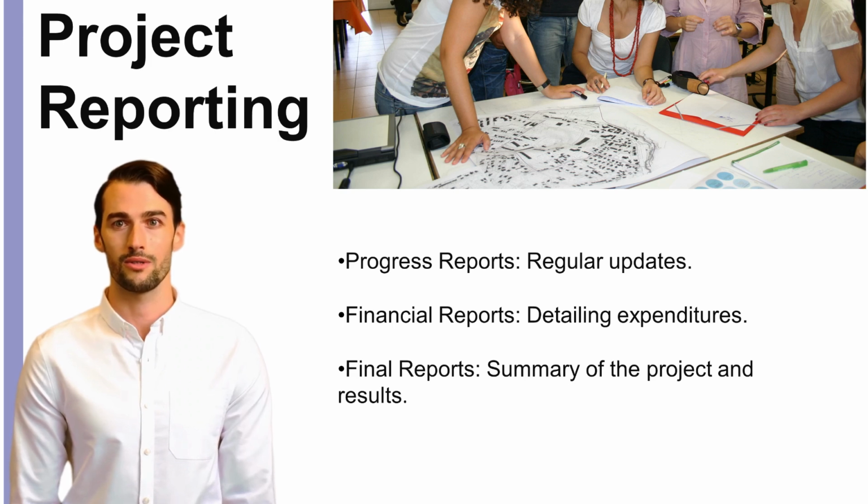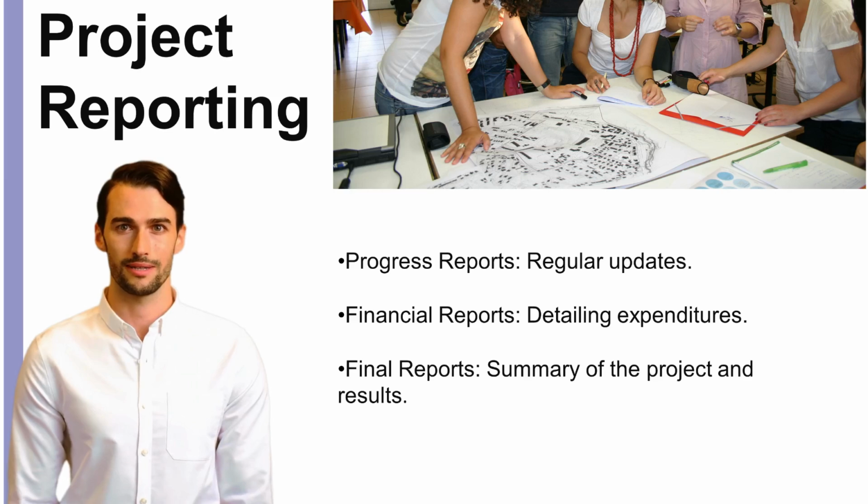Project reporting involves creating reports to share key information with stakeholders. Progress report, regular updates on status, achievements, challenges, and plans. Contains KPIs, work summary, tasks, and risks. It's shared with team stakeholders and sponsors.